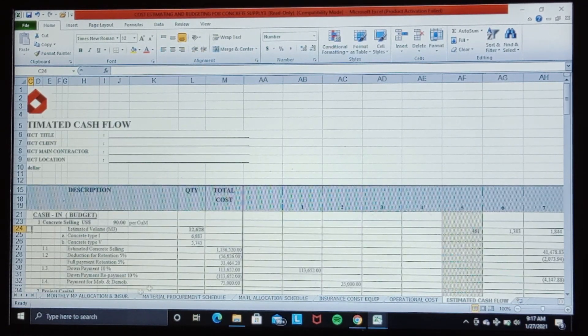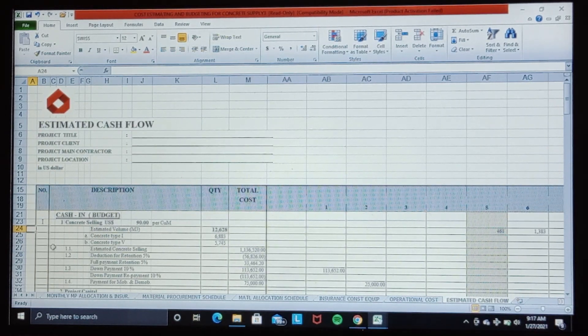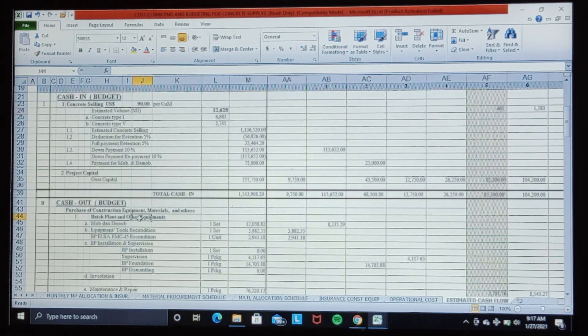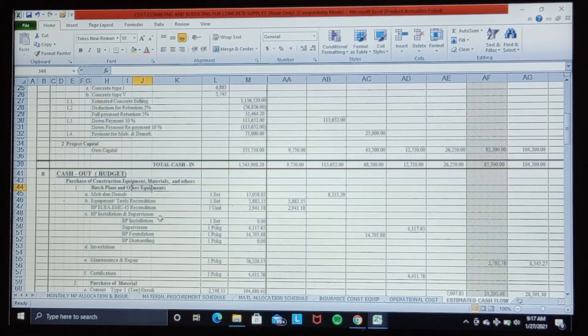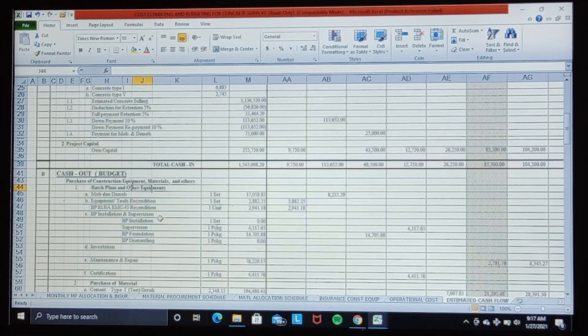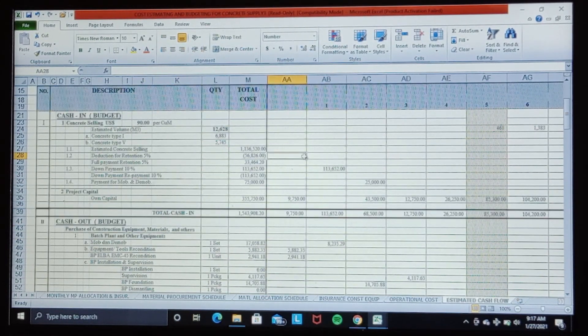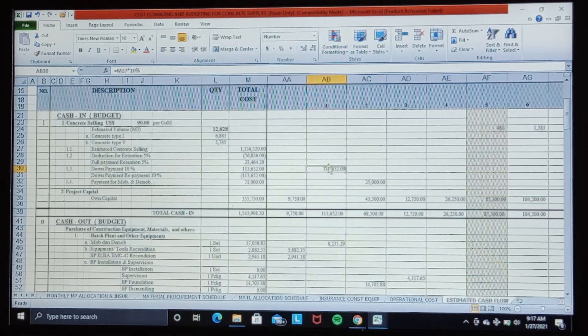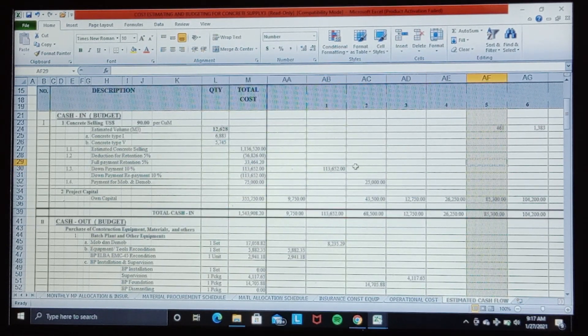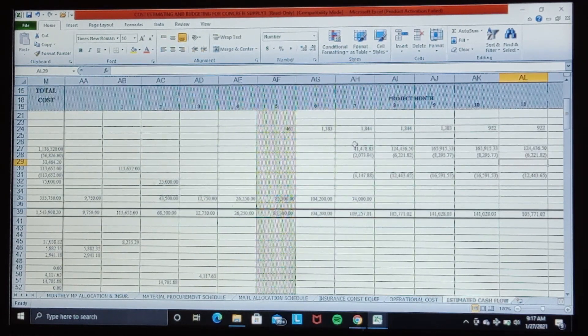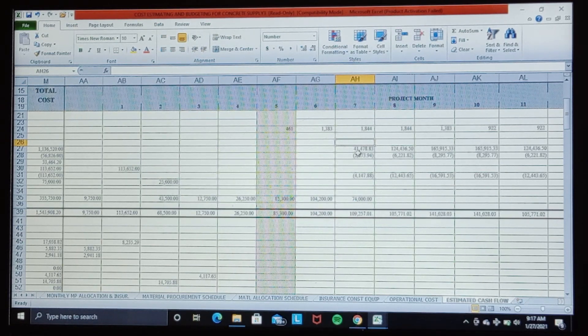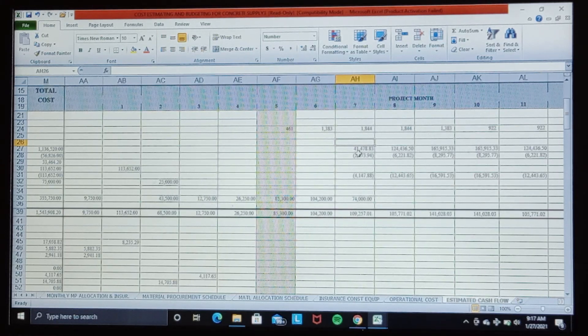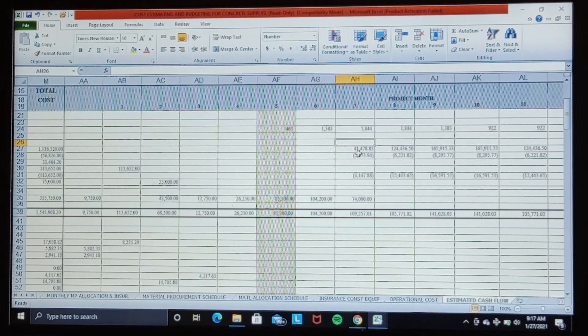Furthermore, the most important part of this program is estimated cash flow, which compiles the cash outflow, allocating all the costs required to run the project as project schedule, also cash inflow, which is the plan of paid progress billings as monthly concrete schedule. This stage might require excellent skills and experience to allocate cash flow sequentially, referring to all schedules so that it is close to real conditions on site and as expected.